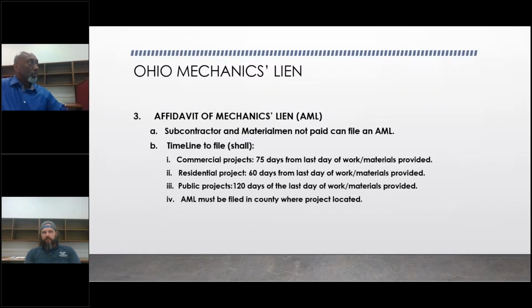I've had slight issues where a general will withhold payment, or hold it until you get that lien waiver signed and in his hands before you can actually collect the check. So it can be a little bit challenging sometimes, but all in all, it's a matter of everybody trying to protect themselves and to make sure that everybody pursuant to the project gets paid at the end of the day.